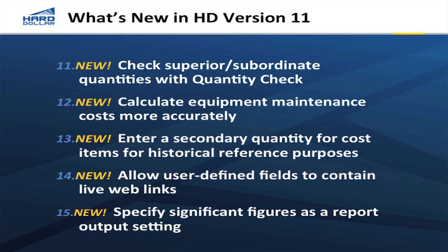Equipment maintenance costs are a big area of functionality in version 11. We have really taken equipment maintenance costs to a new level where you can drive those costs based on your productive equipment, associate those with a maintenance crew, and have those maintenance costs go up as your productive equipment costs go up and vice versa. Secondary quantities — we can track items in multiple quantities. We might want to measure a concrete item in cubic yards but also look at it in tons, and that will help us look at historical costs from different perspectives.